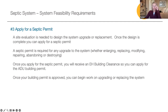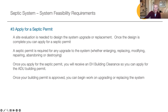Once the septic design is completed, you can apply for a septic permit. A septic permit is required for all upgrades and modifications to the system. Once the design is accepted, you will receive a building clearance that will allow you to apply for the ADU building permit. This is when you can safely begin designing your ADU. Once your building permit for the ADU is approved, you can begin work on upgrading or replacing the existing septic system — but not before the ADU permit is approved.